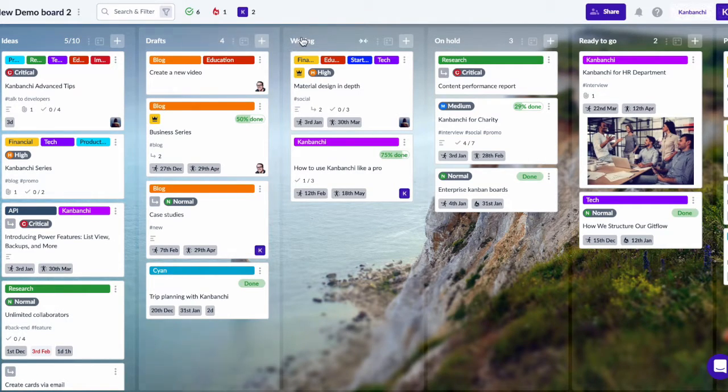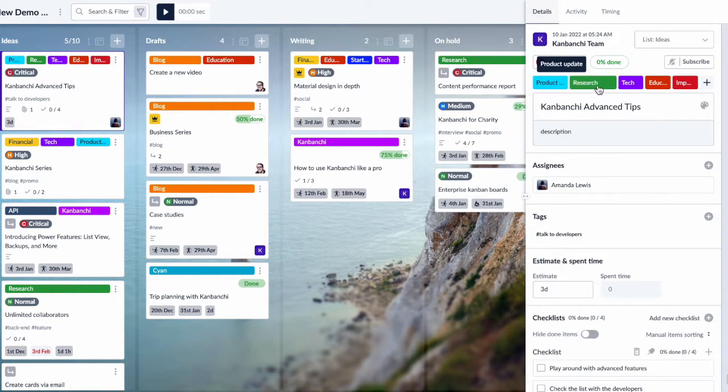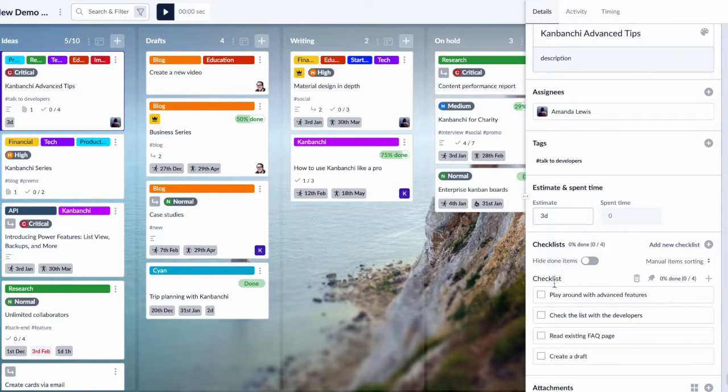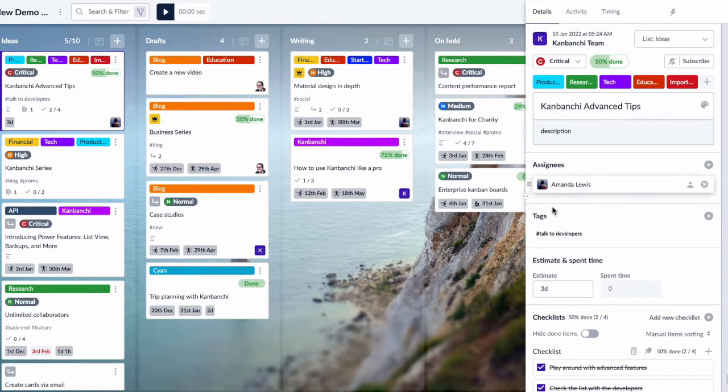The Kanban board is a simple tool that allows you to visualize your work process. It consists of a number of horizontal lanes, where each lane represents a work group or specific project. Cards within each lane represent the tasks that need completion for that respective group, maybe design or programming or marketing, depending on your team. After you add cards to a lane, you can quickly see which areas of your project need more attention and focus.